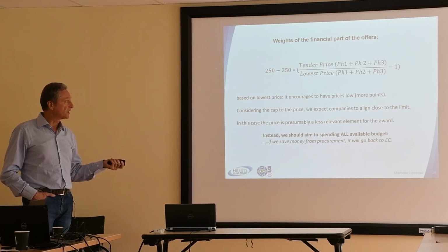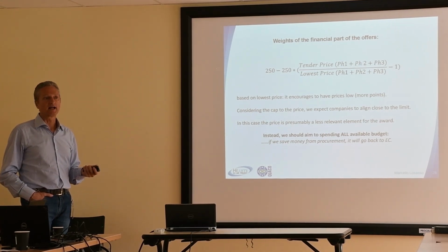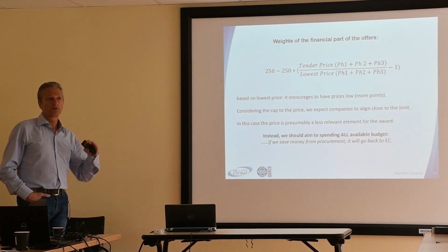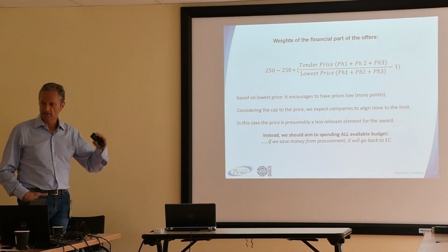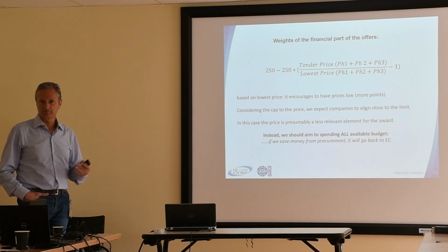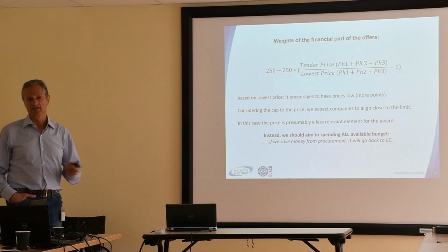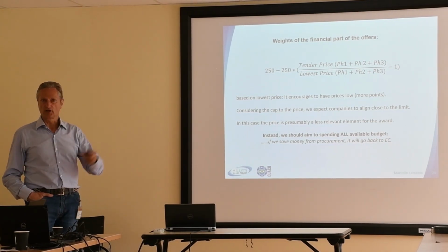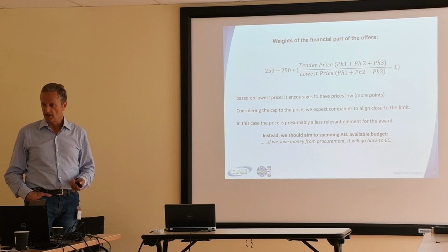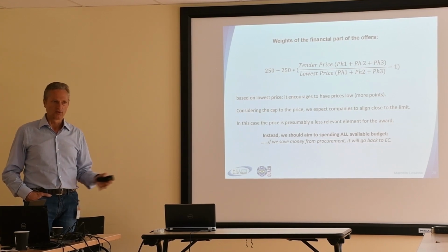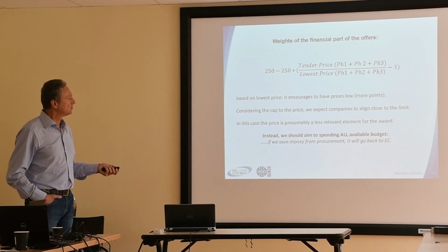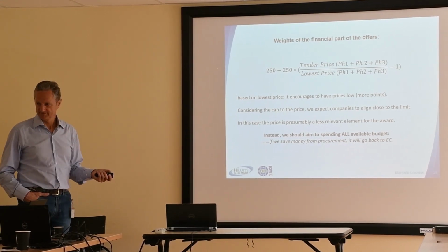I tell you because we had this problem and we had some unspent money from phases 1 or 2 because companies were bidding lower to the limits. So this money that was left, I thought we could have spent in, let's say, more traveling of the team going to follow up the company. No, you cannot do this. So this money has to go practically back to the Commission. So you try to spend all the available budget.